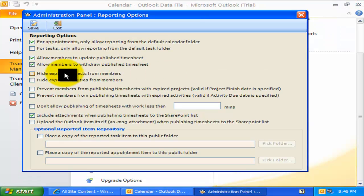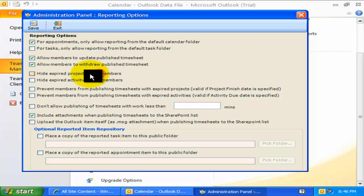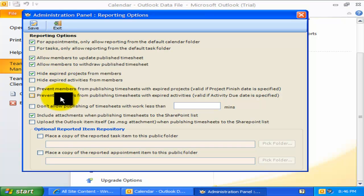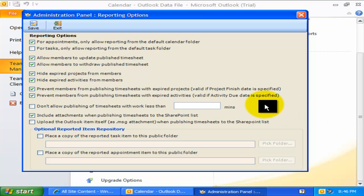Now these four options are regarding expired projects or activities. A project is assumed expired if the end date has lapsed. Likewise, an activity is assumed expired if the due date has lapsed. You can enable these options so that you can prevent members from working on expired projects and submitting their timesheets and expenses to SharePoint.